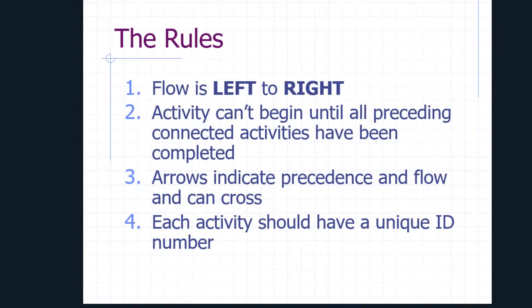And I've seen sometimes people start on the left-hand side of the page, move across towards the right, run out of room, and then start to come back from right to left. Well, that's not the way to do it. What you do in that case is you carry on, you add another sheet of paper and carry on going from left to right. Okay, so it must always be left to right.